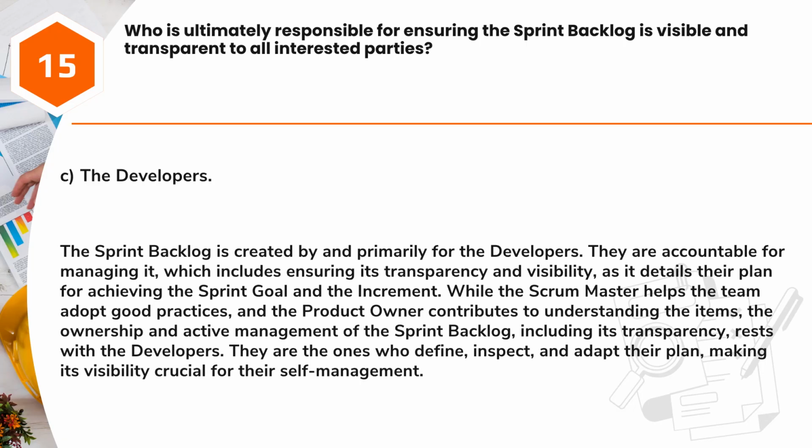Answer: C. The developers. The sprint backlog is created by and primarily for the developers. They are accountable for managing it, which includes ensuring its transparency and visibility, as it details their plan for achieving the sprint goal and the increment.